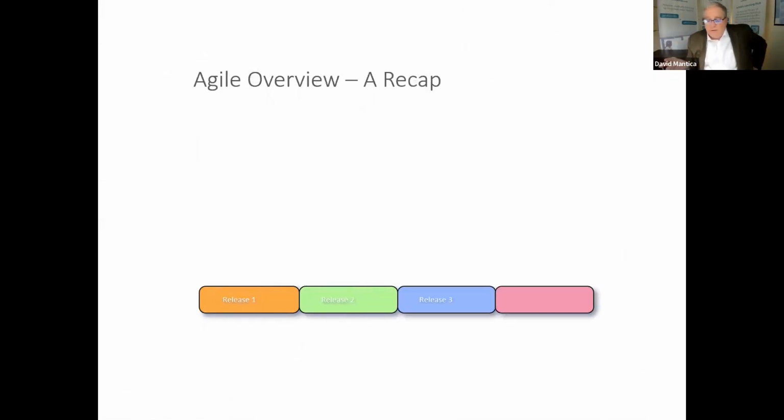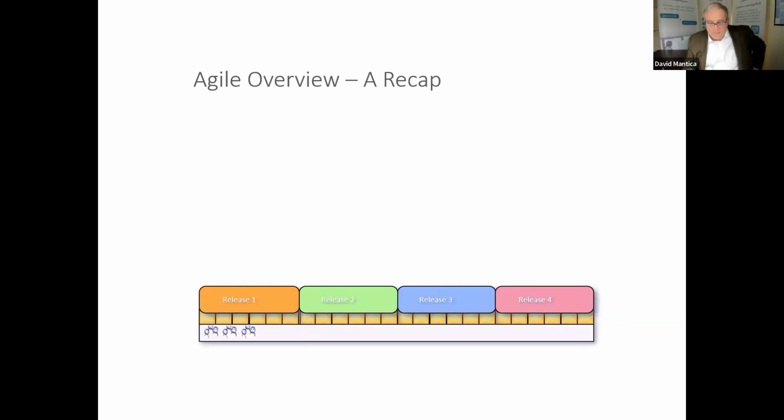So basically this is going to start rolling in an animation, showing you the different levels. That very bottom box with happy people, that's your daily stand-up. Each day you're coming together and saying, this is what I worked on yesterday, this is what I'm going to work on today, and here are my impediments, my challenges. Can anybody help me with that? I think we need to bring these resources in, tight, concise, and to the point each day.